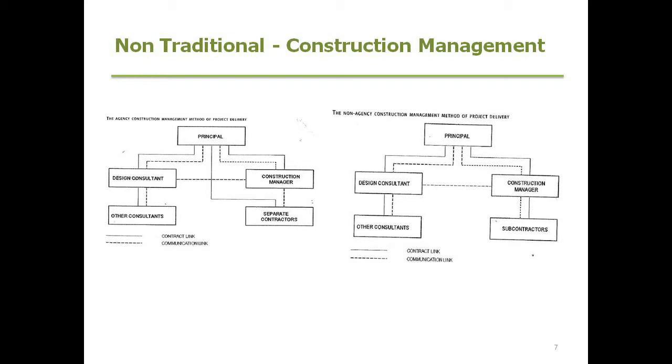The aim, I suppose, with this type of contract is to have time, cost, quality in the best interest of the client. My experience is it's been used for projects such as hospitals, a large children's hospital. The builder gets more involved in this particular form of contract in the design process, and it's an open book of payment where all the builder's costs are reimbursed.